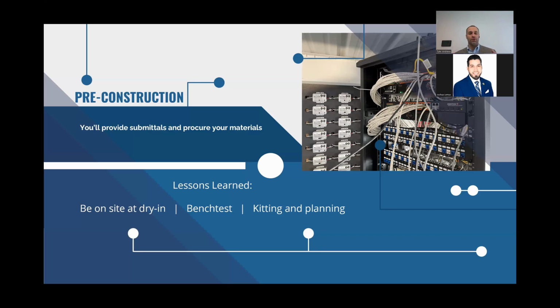What you want to shoot for is, when they enclose the server room or put in the space, to have a fairly clean, lockable space for your networking hardware. I say lockable because we have actually seen electrical contractors get mad, come in, and cut all the networking cabling. I don't know if you've seen that before, but it's happened.